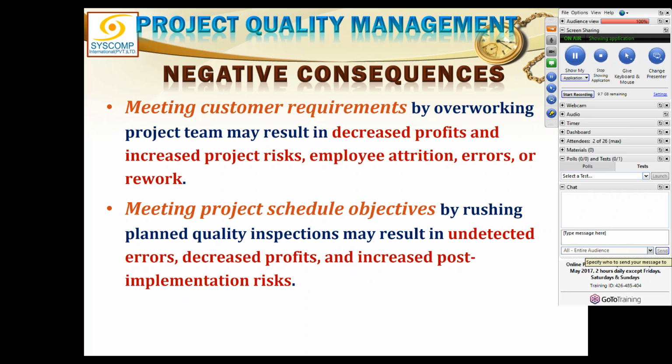But the time which was supposed to be given to quality assurance and quality control was sacrificed ultimately. Although there were quality assurance people, quality control people in that team, but because everything was being rushed, there was not enough time given for inspections and audits. And resultantly, you all must know that the ID cards which were produced and the data which was put into the database had so many flaws that even when the cards were issued to the people, there were wrong data available on the cards.